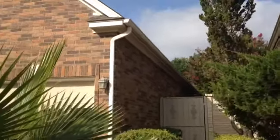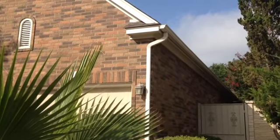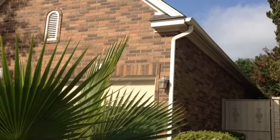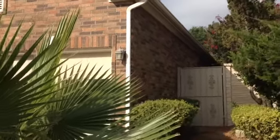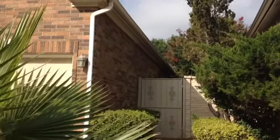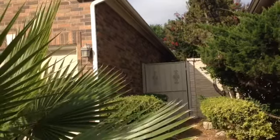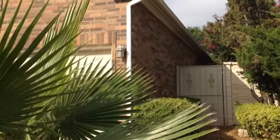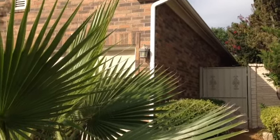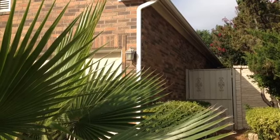We do have some gutters here. We're going to use Chris McClendon from Long Run to take down and put up the gutters that are existing, so we can get to that fascia and drip edge. On the right side of the home here, that's pretty much all we got. There's a small atrium off the master, which only has access through the house. That needs to be painted, and there's a couple windows and a door in there that need to be trimmed. But other than that, the fascia overlay and the drip edge replacement will take place in that little atrium.